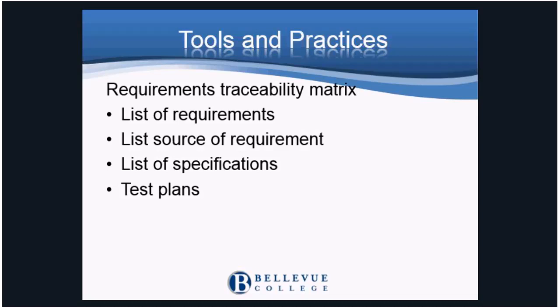The requirements list is just a list of requirements that's used for project planning, such as resource management or quality management. The requirements traceability matrix is a list of the requirements and their source. For example, a business requirement may have been traced back to a specific regulation that a business must satisfy. By having the source information, the reason for the requirement, any tolerance or specification can be verified and test plans can be created.